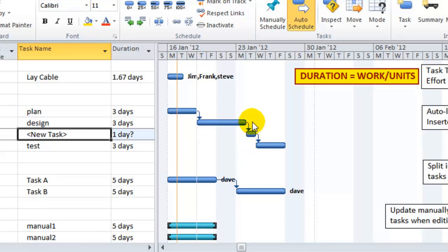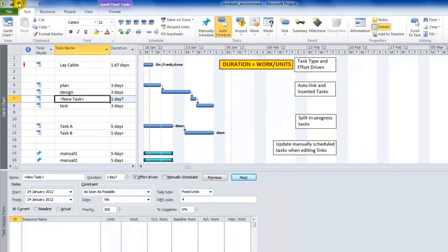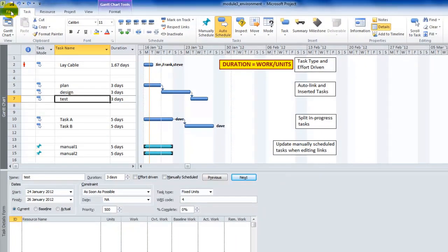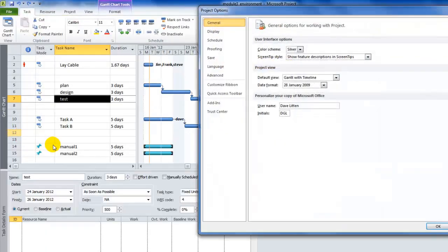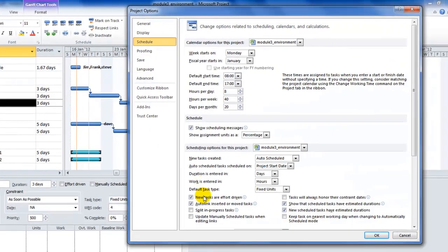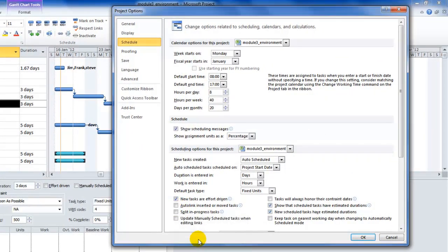You've now got a link which is in error and you may not spot it. Whereas if it sat here as an orphan, you could easily spot it as something you need to schedule into the project itself. Okay, so I'm going to undo and make sure. I could do undo again, but I just want you to see that I want this unchecked.